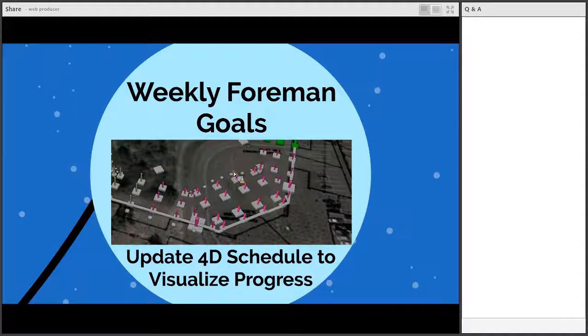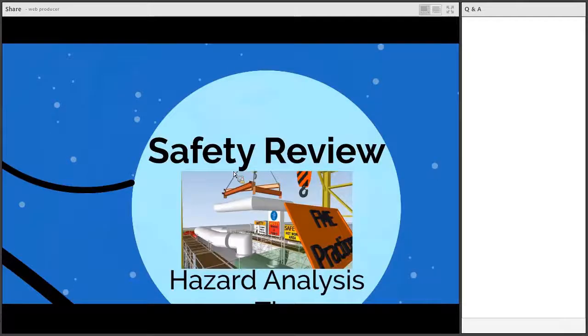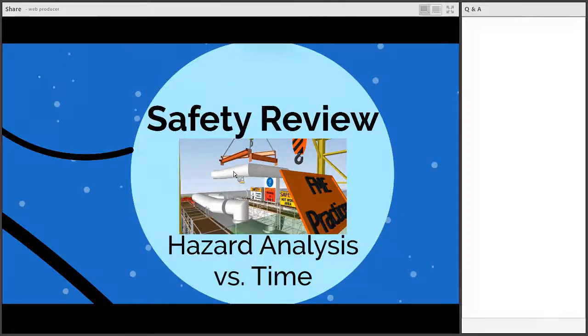If you show a guy a video, I think you have a much better opportunity to communicate the plans. But that could be challenging because the master schedule typically has a weekly short-term schedule. So another application that one of the software packages has more recently integrated into their system is a safety review. Because hazards change versus time, you will potentially look at the life cycle of a project and review different hazards that present themselves over the course of that project.